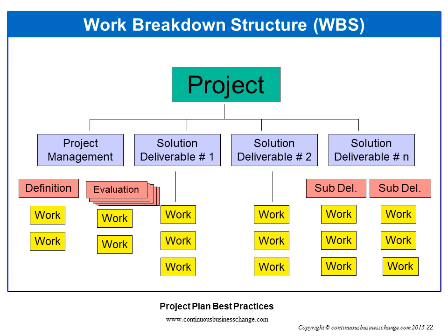Every project needs a work breakdown structure. We strongly recommend facilitating your core team in creating the initial WBS with post-it notes before putting it into any software. The WBS is a picture of your project. The deliverables or nouns that are large can be broken down into subdeliverables, which are also nouns. Not all deliverables need to be broken down into subdeliverables. Deliverables and subdeliverables are created by doing work or tasks. Work should start with a verb like identify, create, establish, produce, and so on.